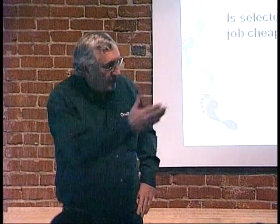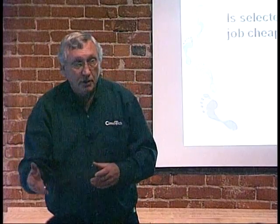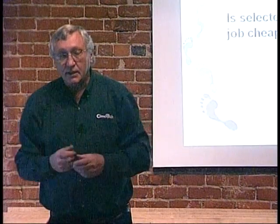That's who you trust. Gary and I and Mike were having lunch one day, and he said, what should I do different next time? And I said, well, for one thing, you should bring the control contractor on board. And I think that's in that write-up, that introduction that Brad gave. Bring the control contractor on board. Get their buy-in. Get them thinking about what they can do with those controls to operate the equipment, to make the design work, and to meet the design intent.